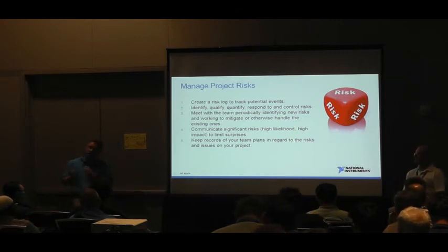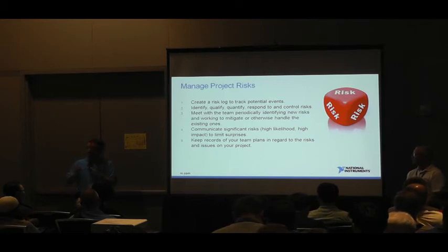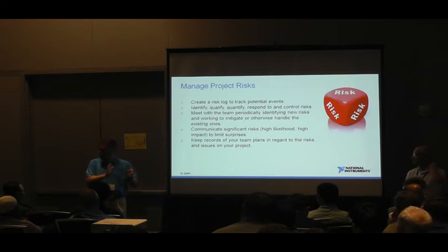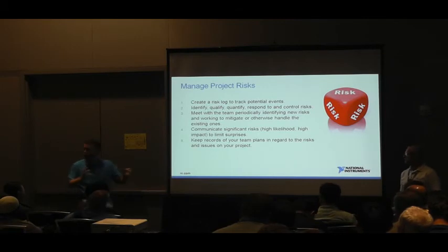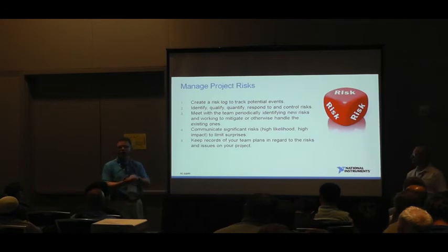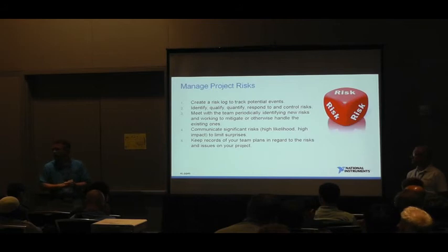So whether or not it's transparent that that's what's happening, sometimes it's just a buffer that you add, saying, I'm going to mitigate my risk by putting a buffer in here. But you can actually name it. That's the point. This is contingency. You could. So if you plan to maybe push that money around for different parts, it's whatever you negotiate with your customer. Right. We would like to add X amount of dollars of contingency, unknown. Especially if you're doing, well, I guess you could go on both fixed price and time and material. Yes, that's a great point.